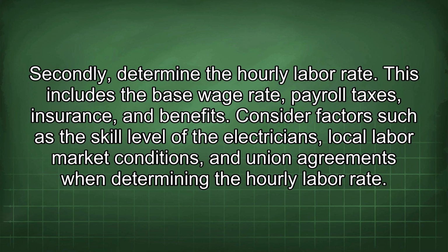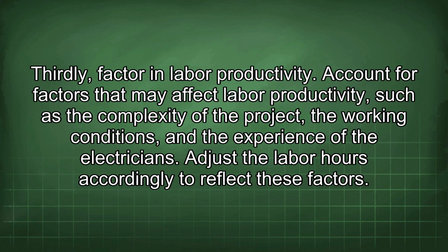Secondly, determine the hourly labor rate. This includes the base wage rate, payroll taxes, insurance, and benefits. Consider factors such as the skill level of the electricians, local labor market conditions, and union agreements when determining the hourly labor rate. Thirdly, factor in labor productivity.